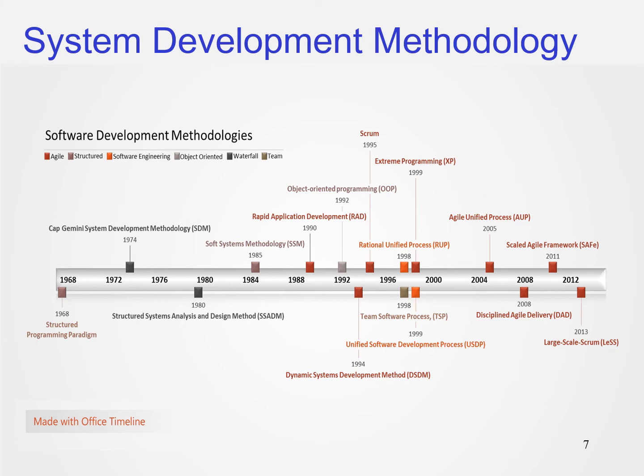Extreme programming, dynamic system development methodology, and so on. So agile is actually one philosophy whereby when they create a software, they will have the user involved all the time, and they try to create the software parts in a shorter time period. Maybe, for example, they set a time 2 to 4 weeks and they come up with a small function, and then they will show it to the user.